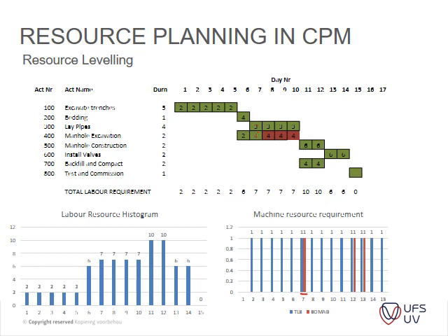Instead of being completed within 2 days, for the manual excavations we now need 4 laborers for 4 days instead of this 1 day where we had the 1 TLB at our disposal.